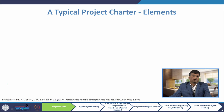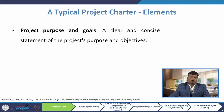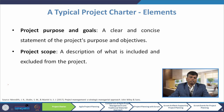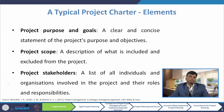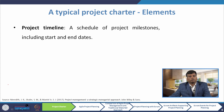Now we will show the typical project charter elements. First, the project charter will contain project purpose and goals — that is a clear and concise statement of the project's purpose and objectives. The second element is project scope, a description of what is included and excluded from the project. Then project stakeholders — a list of all individuals and organizations involved in the project and their roles and responsibilities. The next element is project timeline, that is a schedule of the project milestones including start and end dates.